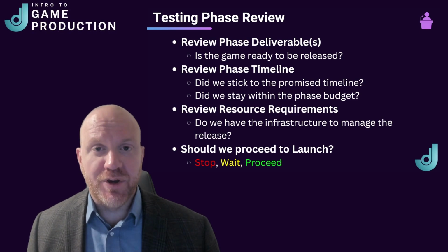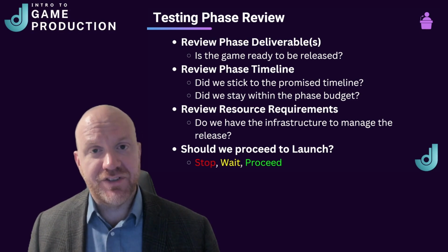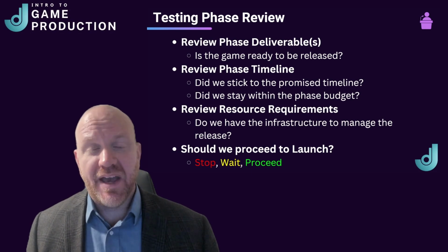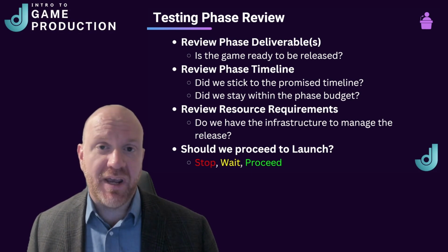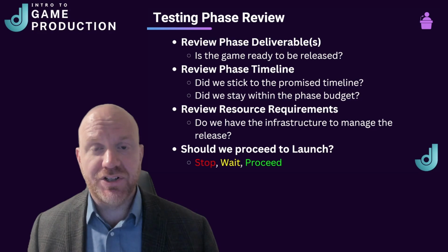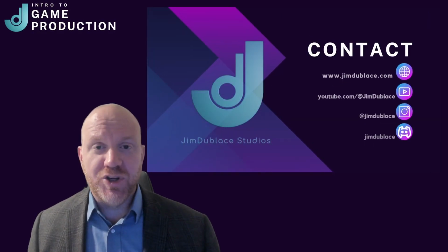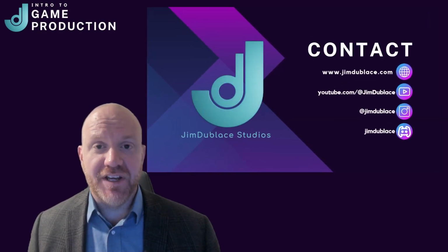And you'll want to review resource requirements going into the launch phase to ensure that you have the infrastructure in place to handle the launch. At the end of this meeting, a decision needs to be made on whether you're ready to proceed to launch, or whether you should wait until additional testing or additional deliverables can be completed. And if all goes well, you should be ready to proceed to the launch phase of your project.